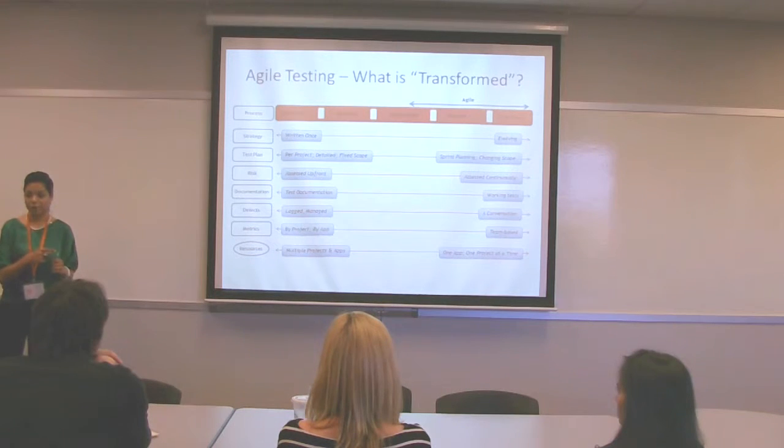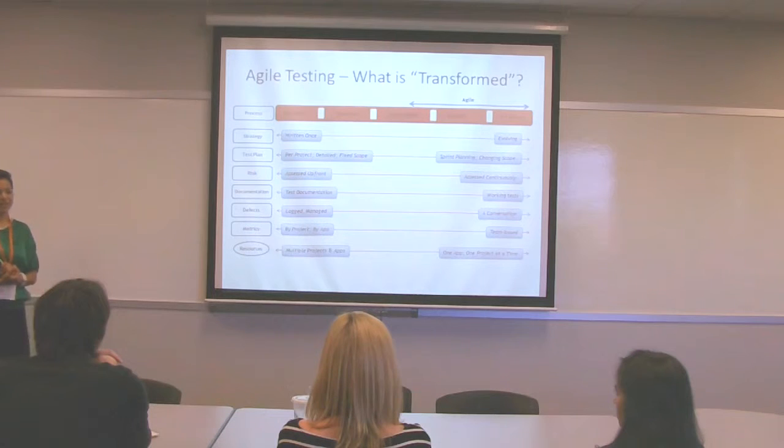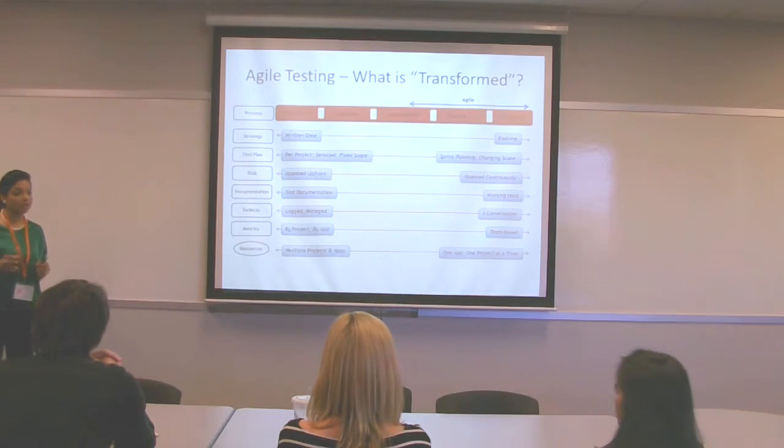And I said, okay, first point, this developer is out for 2 weeks. The testing tasks related to this story may not be completed, or this tester is out for 2 weeks for this iteration. So you point out any and every kind of risk that you see. Say, okay, this needs SOAP UI to test web services. We do not have anybody on our team who knows SOAP UI. So it's a risk. So instead of just saying having an inappropriate skill set or not having the full skill set, you actually point out what you see as a risk. Define the risk. It is ever-evolving.